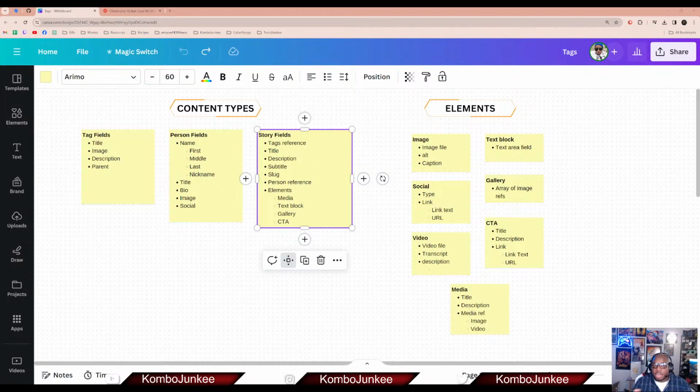And then in the next iteration, right, you have another planning ceremony, because this is an ongoing ceremony, where that developer may pick up the second 2-layer ticket, right? So I'm going to do the second 2 layers. And now that the second developer has time, there are 2 developers in this example, they may pick up that third ticket as well. So they may say, hey, if this developer gets done with the second 2 layers in time, I will go ahead and pick up this third ticket. Right? So that's kind of what the sprint planning is.